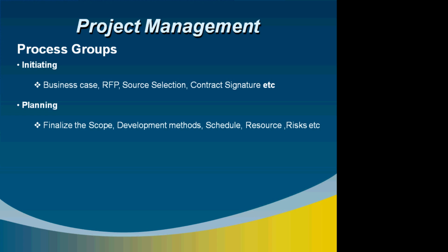Finalize the schedule: when we are starting and ending the project, what the different phases involved are, and what the different deliverables are for each phase. These are some of the activities that we need to finalize in the schedule. It is always smart to get a sign off from the customer about the deliverables before starting the project. Finalize the resources, which means identifying the team, the different levels of access needed for the project, etc.